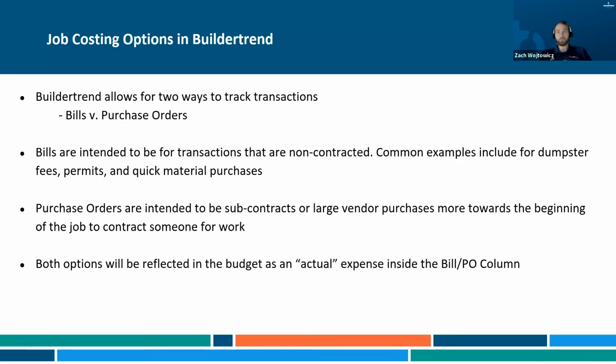Estimates, your budget. And a very popular report in QuickBooks is estimated versus actual. Actuals. And really what Buildertrend is doing is taking our bills and POs, and putting it into the actual column. So you are in real time updating what you paid as you enter information into Buildertrend, so that when you're looking at the budget report, which our next episode will dive deeper into what those reports look like, you're at the base level.